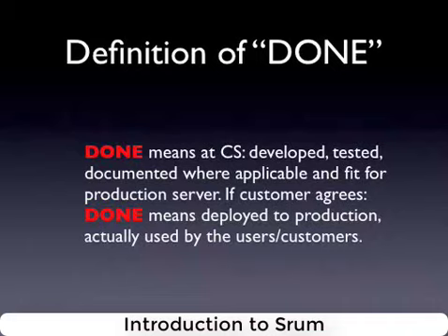As I said, for shrink wrap software, or for example for embedded device drivers, the definition of done will be slightly different in wording, but the sense is the same. Whatever is done is to be of high quality, it's to be of production quality. And it's very important because the scope in a Scrum project is a bit flexible. The product owner can change the scope all the time. And if something is not done and it's not of production quality within the sprint, it kind of falls back into the product backlog. It's rare, but the method makes a provision for that, and it does sometimes happen. So the method is so optimized as to fix the quality, and this is a very important fact.